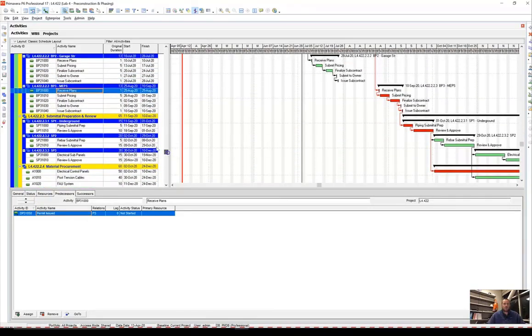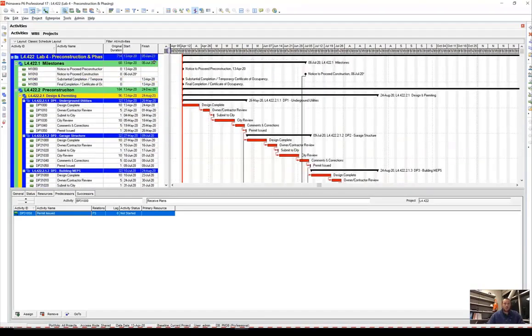Now I'm going to leave this up to you all. Go ahead and complete the phases for the submittals. We already did it for the procurement, so really you just have one last step. So right here you can just see all these submittals are based off of one another. That is not how we want to do it. We want the submittals to be based off the individual bid package. And right away, wow, we already got rid of,